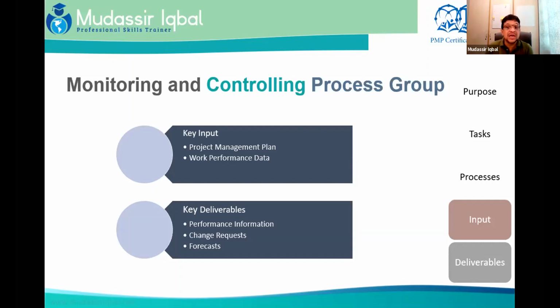from escalating in the project. During this stage, it is important that you have a well-developed understanding of risk assessment and management, because everything which is not going according to the plan is a risk. If the plan was supposed to be 10 days and you are using 12 days, it's a risk that you will go beyond your approved schedule and budget. So understanding of the risk is very, very important once you are dealing with monitoring and controlling.